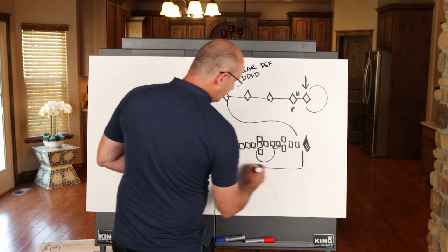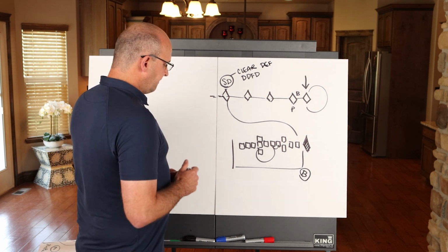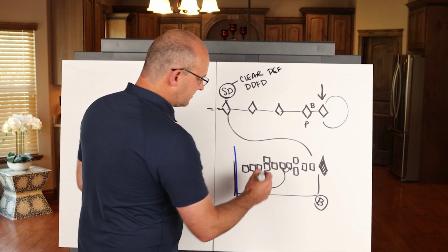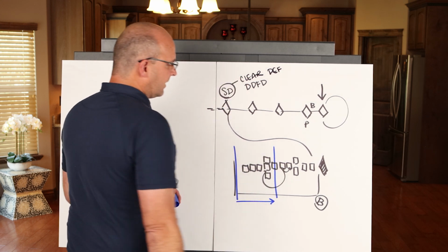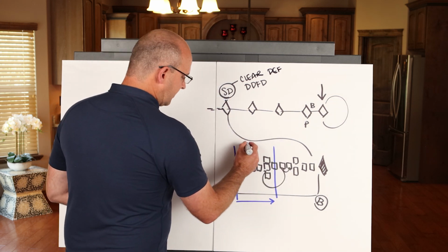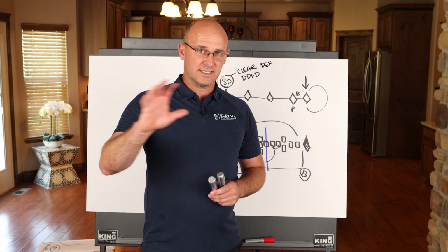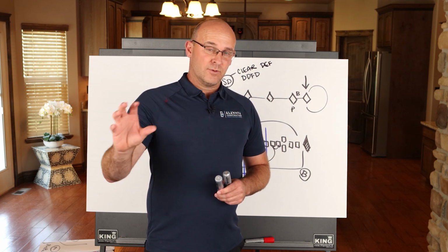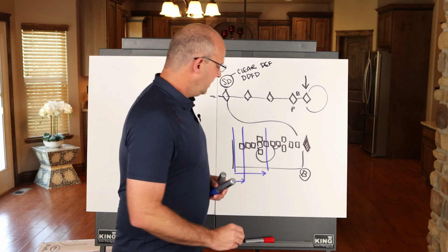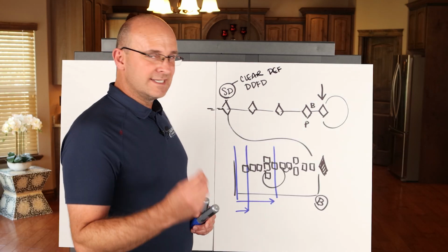So let's say that you did take this schematic design milestone, and now you have a pull plan, and you verified that the overall duration is accurate and that you also have a buffer at the end. Great. Now what you can do is you can filter out your look-ahead plans. That means you, working with the design team, or they can do it themselves, can look out 6 weeks and start planning for the work coming up and making work ready for these design activities. And the other thing is that they can create a weekly work plan. That means that everyone on the design team knows exactly who's working on what, inside what disciplines, inside what teams, what clusters, what scrum groups, however you have your team organized. You can see your look ahead, remove roadblocks, make work ready, and you can see your commitments for the next week and really stay on track.